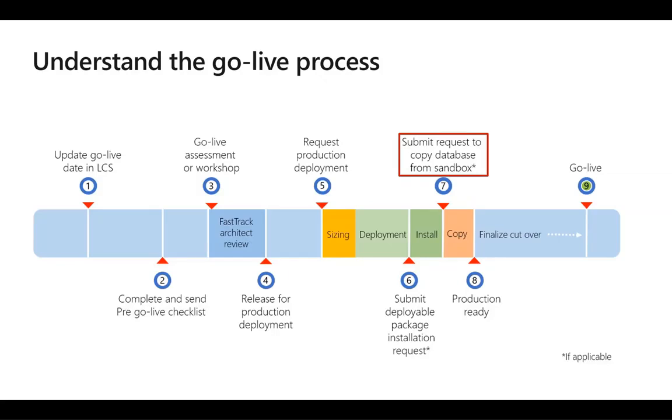Generally, the database copy is completed in less than 1 hour, but Microsoft still recommends that we provide a downtime window of 2 hours in case rollback is required for any reason. The eighth step is the production ready step.